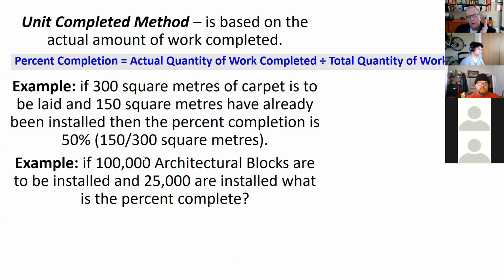It's one thing if you have, because it was like huge gymnasiums, ice arenas, that sort of thing, right? It's one thing if you're doing long straight walls, how fast you go. It's another thing if you're doing a bunch of little washrooms and doorways and window openings and a whole bunch of stuff that slows you down, right? So it doesn't always fully represent how far along necessarily you are time-wise, hours of work-wise. That's the little space between the spaces that I'm trying to say.